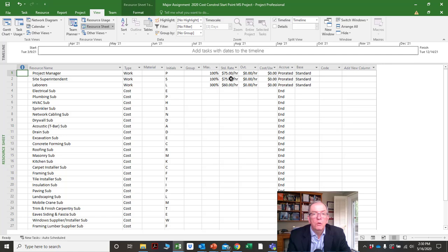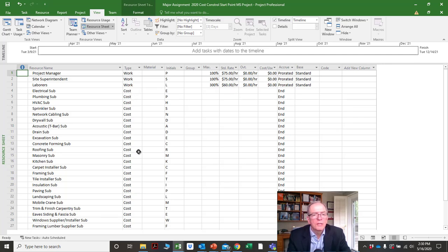When you apply them, it will calculate how much. For example, if you have a superintendent working 40 hours a week at $75 an hour, it will automatically calculate what that total is. The ones listed as cost are for subcontractors procured at a set rate.